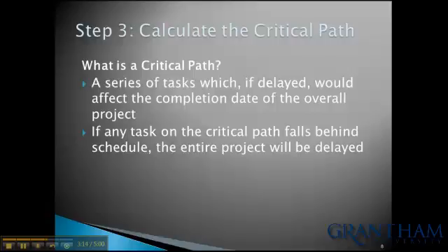Then you have the critical path. The critical path is a series of tasks which, if delayed, would affect the completion date of the overall project. If any task on a critical path falls behind schedule, the entire project will be delayed.